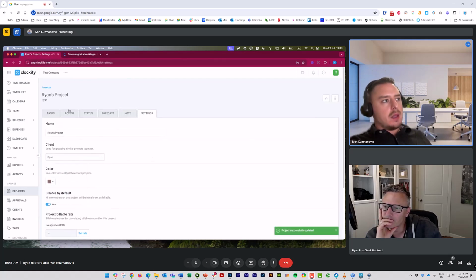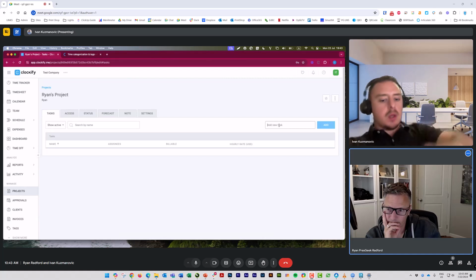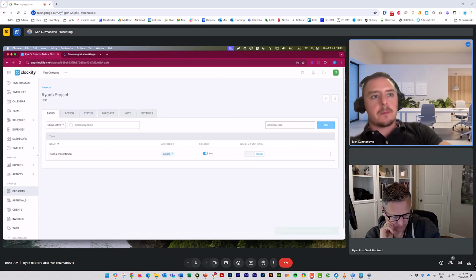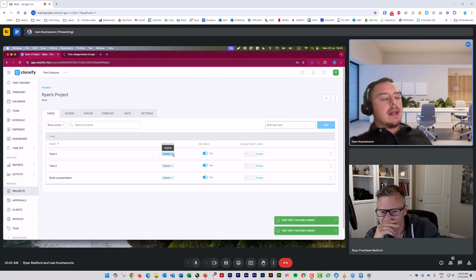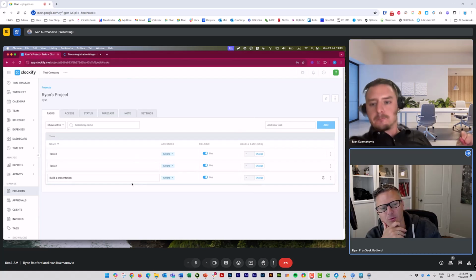Ryan is my client. And when I come back here, I want to define tasks. As you said, for some projects you're going to have only one task, which is build a presentation, correct? So build a presentation, or we're going to have some more tasks on some other projects, so it's going to be task 2, task 3, whatever. And as you can see here, we have the option to set up the billable hourly rate per task. Whenever any user chooses that particular task, this rate will be applied. So that's the hourly rate that I would be charging my clients.